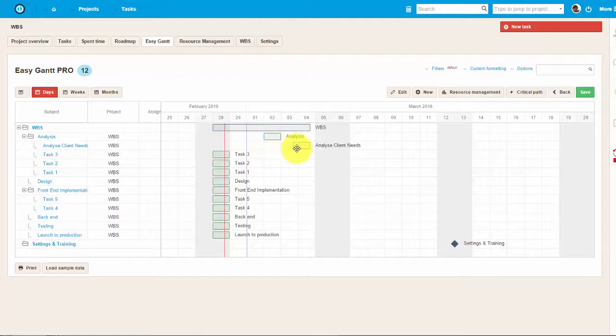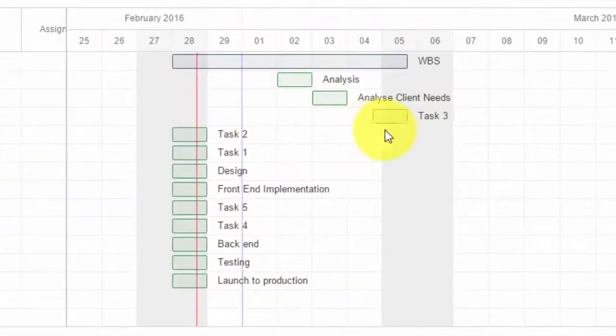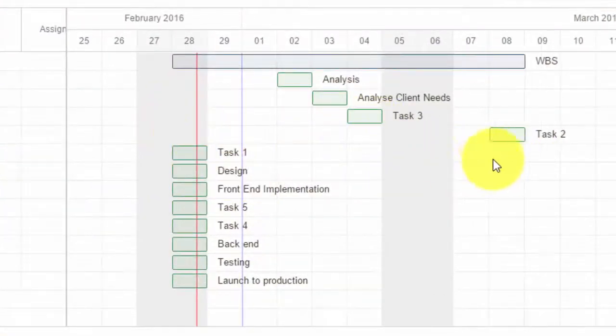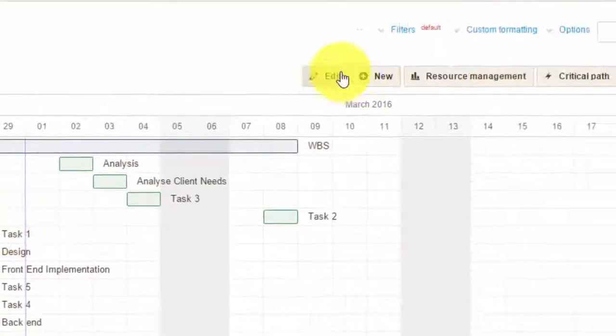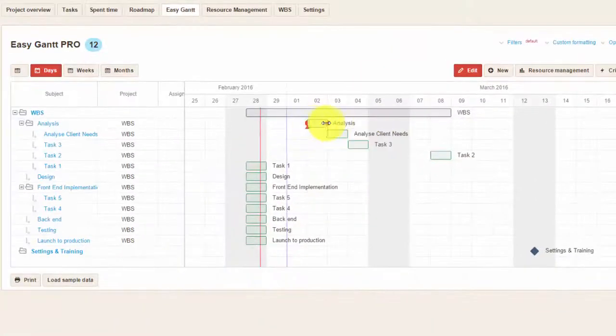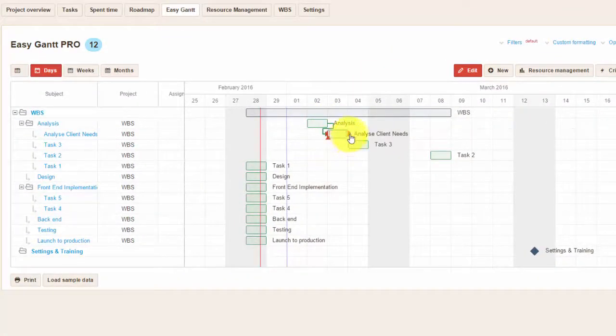Using drag and drop feature, you can change the timing of the tasks. By clicking on the edit button over here, you can easily create links between the tasks, just like this.